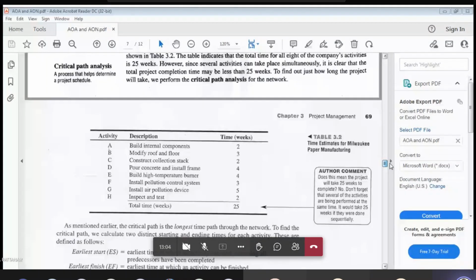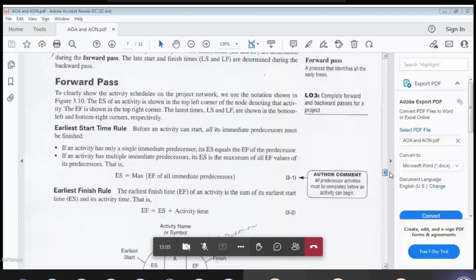Suppose you are using activity on node type of construction approach, then there will be another difference compared to the AOA. If you remember, in the AOA case, what did we do? Near the node we wrote only two values, making a block: earliest start, latest start, right, representing earliest and latest. We calculated only two values, forward pass and backward pass.